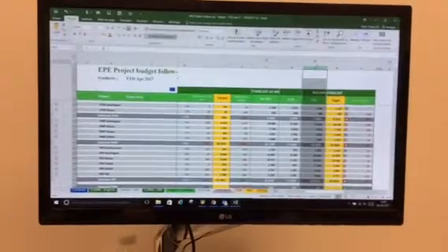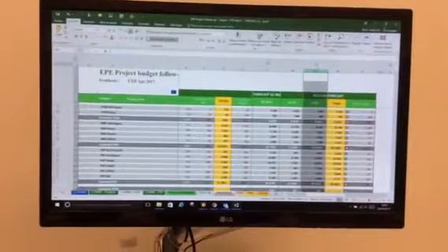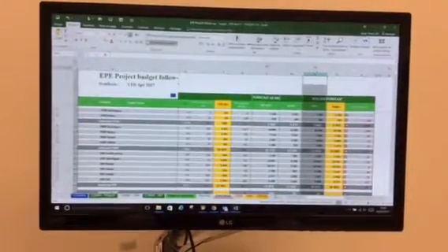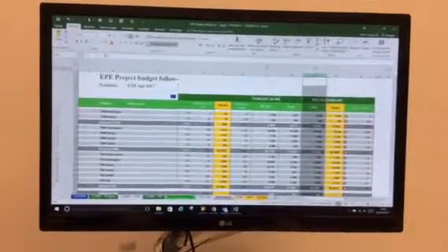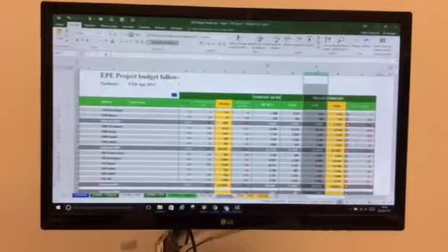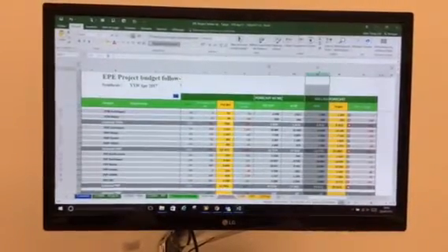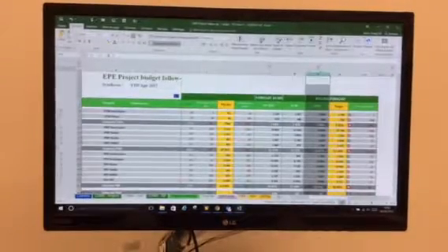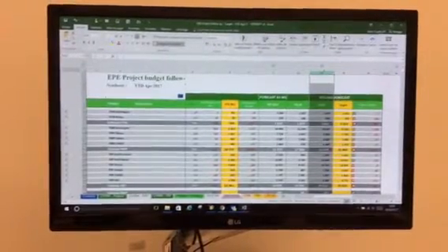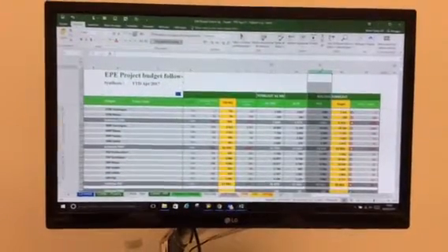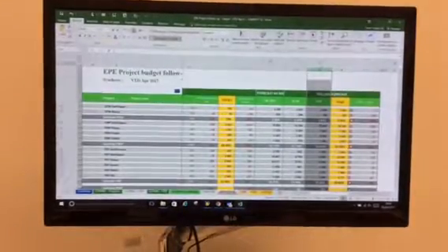In fact, our objective is that the target is given at the beginning of the year only once. However, during the year, for each quarter, we try to give the rolling forecast. It means that, for example, by end of March, we see already what was spent during January to March. We don't really adjust the target, but we see that maybe we will have the landing differently from what we have foreseen at the beginning of the year.